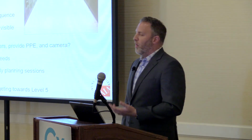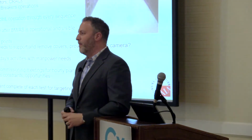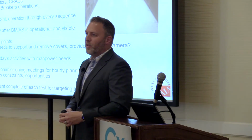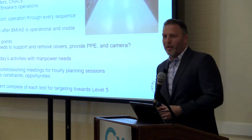Only do your functional testing when the BMS is up and running. Don't try to say, well, you can keep working on it. There's not a lot of time. He needs to do all that during the level 3 activities so that you have a good confidence that that system is up and running. Also require logins, logins for your team so you can all access the building automation system.